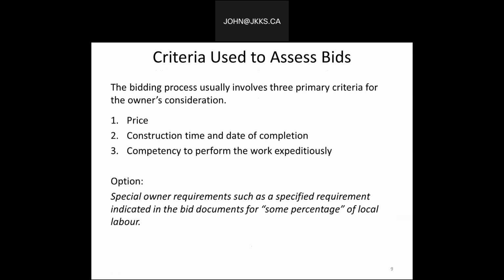There might be special owner requirements, such as a specified requirement indicated in the bid requirements for some percentage of the local labor to be included or considered as being favorable to a bid. So accepting the lowest bid is not necessarily in the best interest of all parties involved.